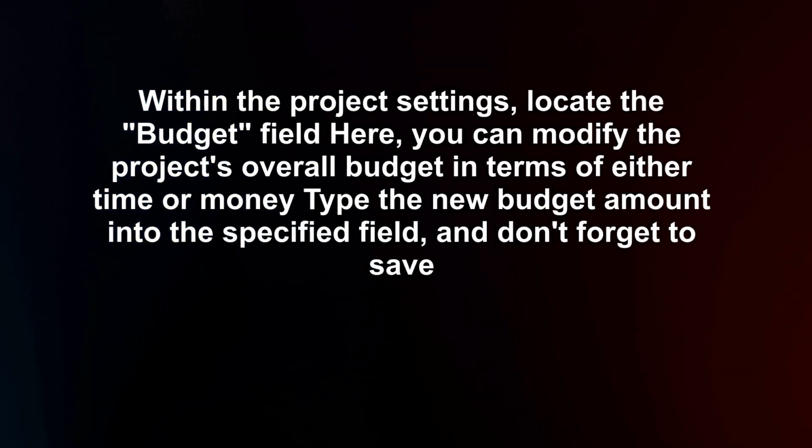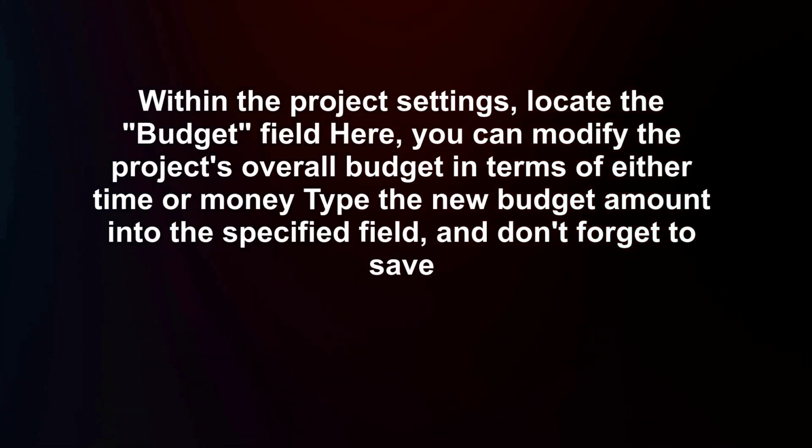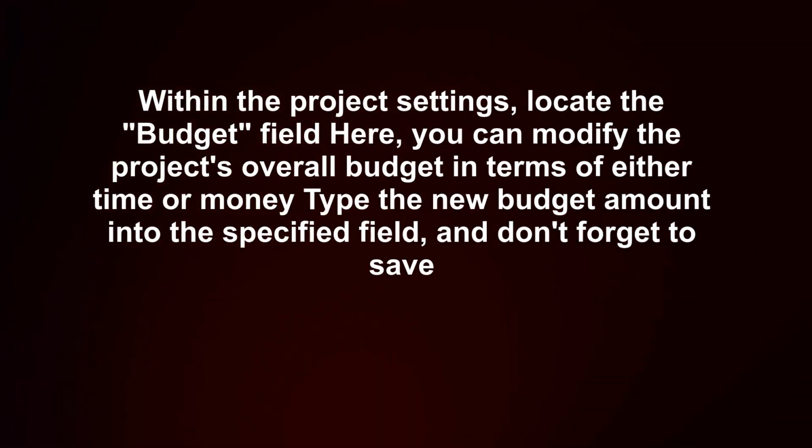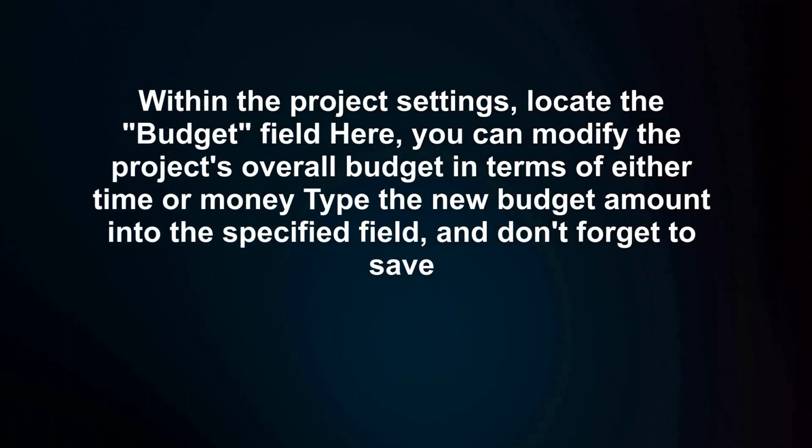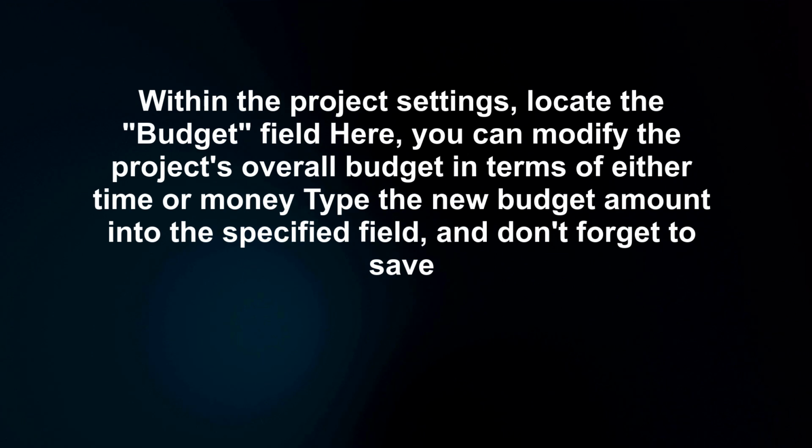Within the project settings, locate the budget field here. You can modify the project's overall budget in terms of either time or money. Type the new budget amount into the specified field, and don't forget to save.